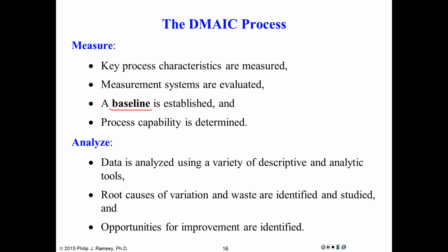So in the measure phase, one of the key activities is baseline current performance. Okay. This again is often something that isn't done or done carefully. So people do a project, they believe they've made improvements, but given they had no original measurement of performance, they can't really clearly demonstrate that they had done any good. So this is the measure phase.